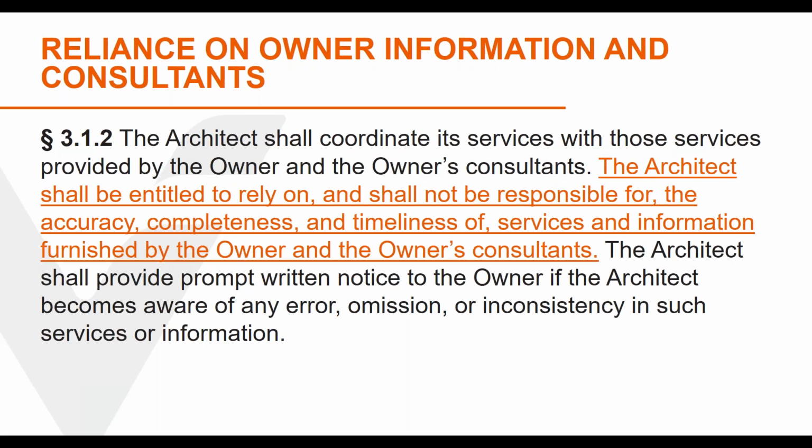Now, look at this highlighted sentence. Some owners' contracts state that the design firm cannot rely on anything provided to it and must verify information. Obviously, to do so is both a huge increase in services and exposure. And if you are working with client-provided consultants, you have no control over them. So by stating that you have the right to rely on them reduces your exposure if their information is wrong or their service is incomplete or negligently performed. So it's important to have this reliance language in your contract.